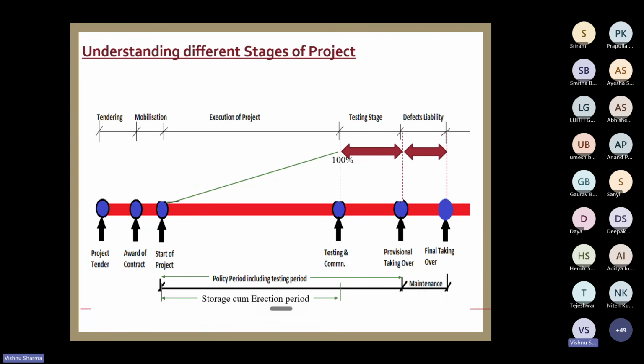You please go for operational cover. Either you take an IAR policy or you take a fire policy, whatever you want, MBD, fire MBD, or you take a combined industrial all risk policy, property all risk policy, whatever as the case may be. Some operational policy has to be taken at this stage, and during this period, any operational loss will be paid in those operational policies, not under the EAR policy. Maintenance period will not pay. Maintenance period will cover only those losses which have taken place during the course of maintenance.